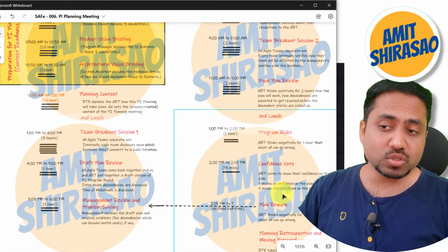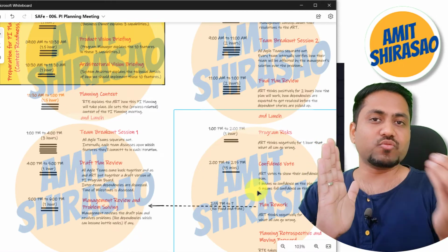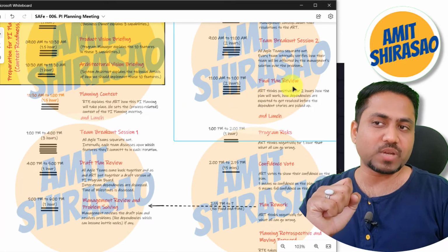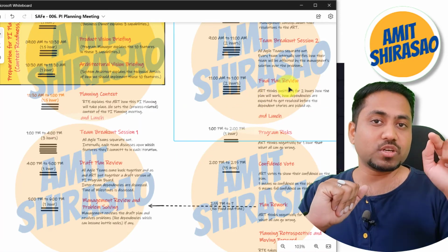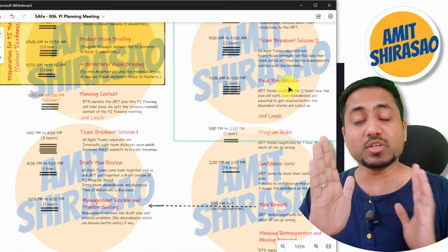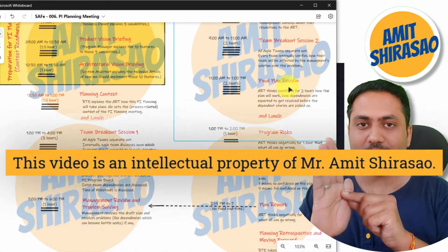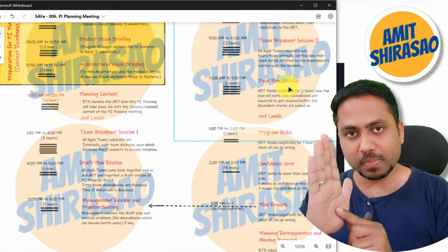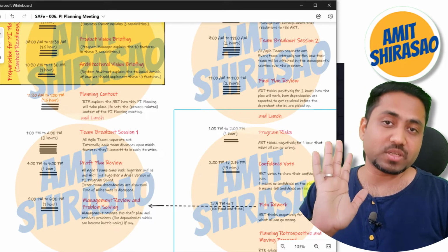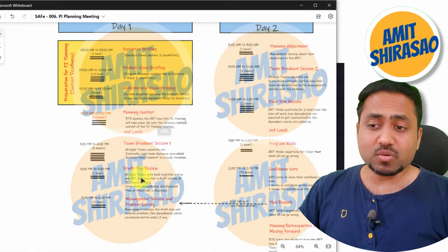Okay, and those votes are from 1 to 5. If I have 100% confidence that this final plan is going to work, then I'll vote 5. If I'm very skeptical, if I think it's not going to work, I'm very confident that it is not going to work, then I'll say 1. I won't say 0, I'll say 1. So 1 means no confidence in the plan, 5 means full confidence in the plan. Now that is your confidence voting.